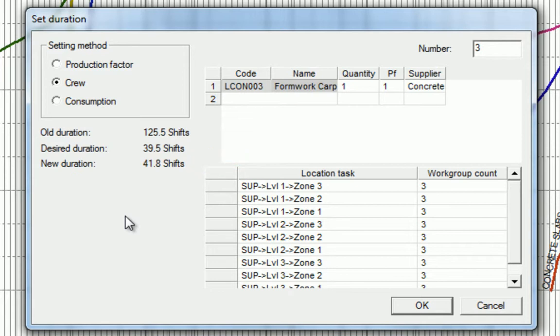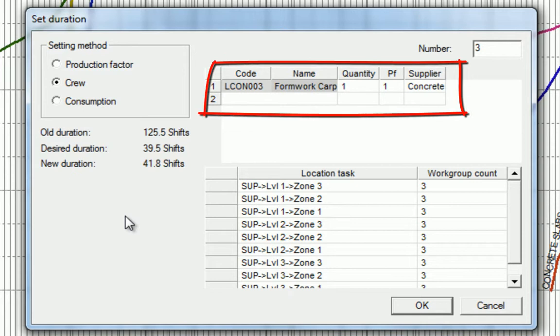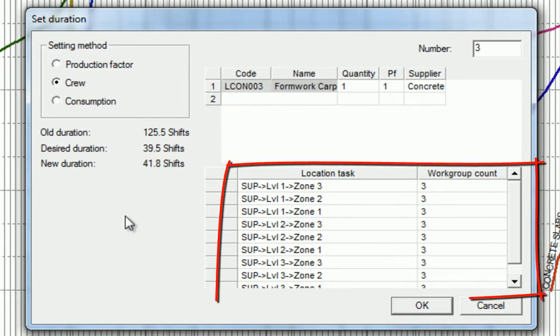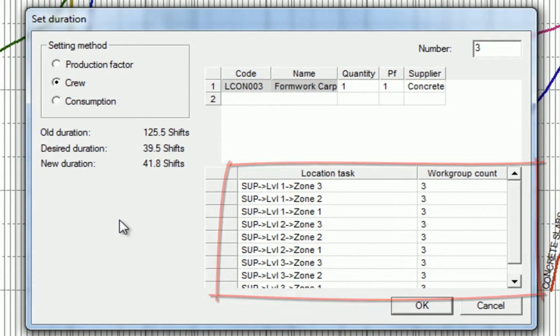If you choose to change the crews, we can also redefine the optimum crew size and set the number of work groups per crew by location.